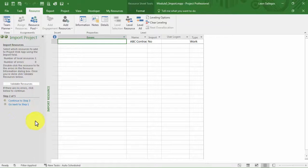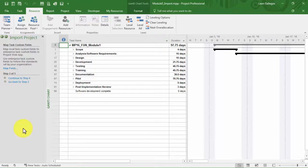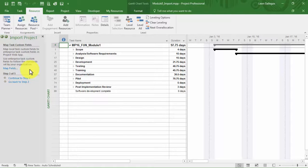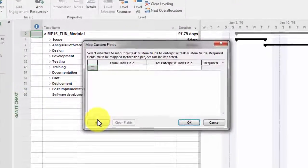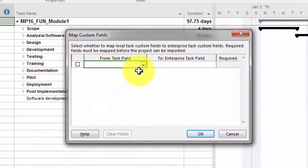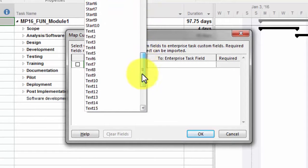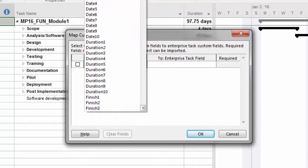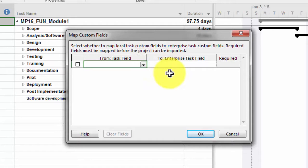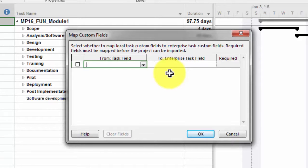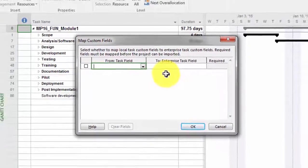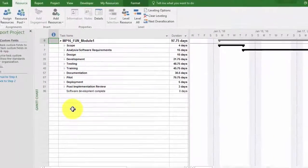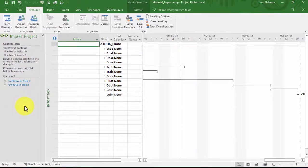I'll continue to step three. In this step, it wants to know if you have any custom fields, and if you do, let's map them up properly. So I'll map my fields. Here, this is the local file; it's looking for any customization that you might have performed around this local file and it would map it to your enterprise task field. Speaking of these local fields, you can work with them, create them, and manage them as much as you need to, just bear in mind that if you don't perform the mapping here, it will be isolated to just this project schedule. It's not considered to be an enterprise field; in other words, the data won't be moved over as it should be.